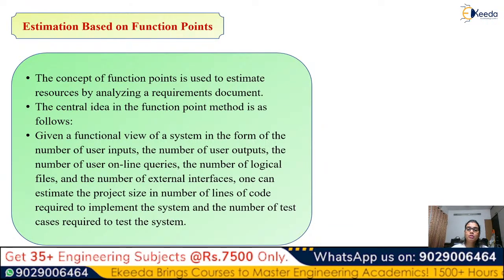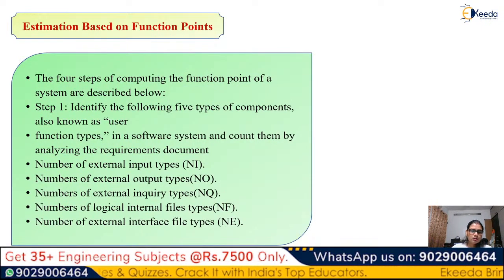They are dependent on the user inputs, the number of user outputs, then online queries, number of logical files, and number of external interfaces. One can estimate the project size in number of lines of code required to implement the system and the number of test cases required to test the system.